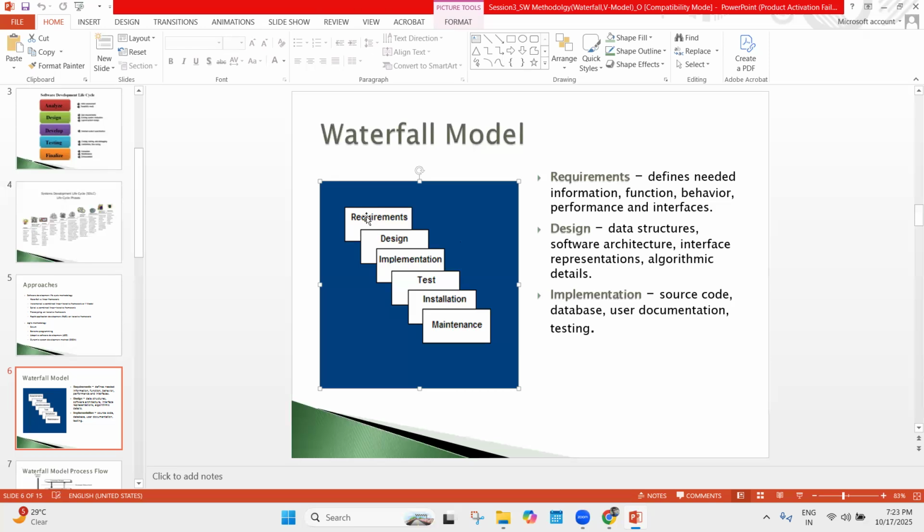When I'm working on the requirements phase, I need to capture all the requirements of the project, document all of them, and then get the approvals on the requirements that I have prepared from the business. Till then, the design, implementation or QA teams will sit idle. Idle in the sense that they will not be assigned to the project; they might be working on some other projects. Once the requirement phase is done, they will be allowed to start working on the design phase.